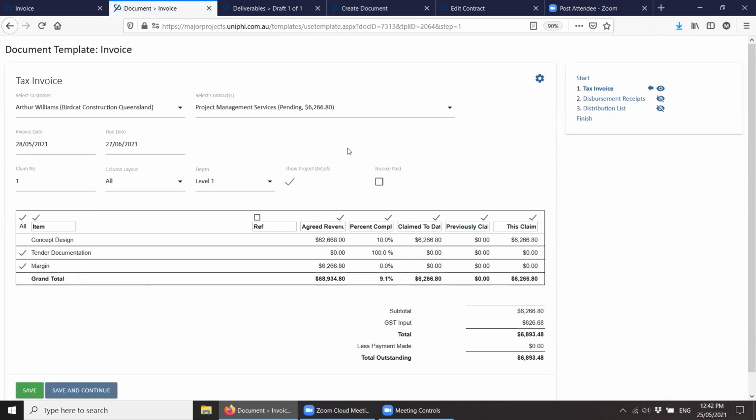So the benefit is you've got a lump sum contract, but you're able to track hours against that lump sum contract to see how you're performing and to find out why. And hopefully through those deliverable comments, raise issues, go back to the client early, get a juicy variation, make money out of that variation, continue to print money and have wonderful lives.